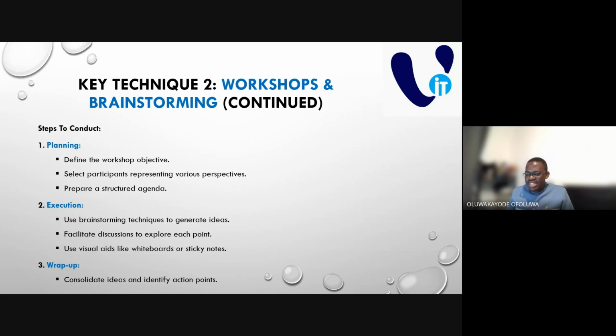Prepare a structured agenda. Very, very important for a workshop, or else I promise you, you will lose it. You will lose that agenda. You will lose that session to them talking about something else. So you want to go there with a structured agenda that has time allotted to every activity.